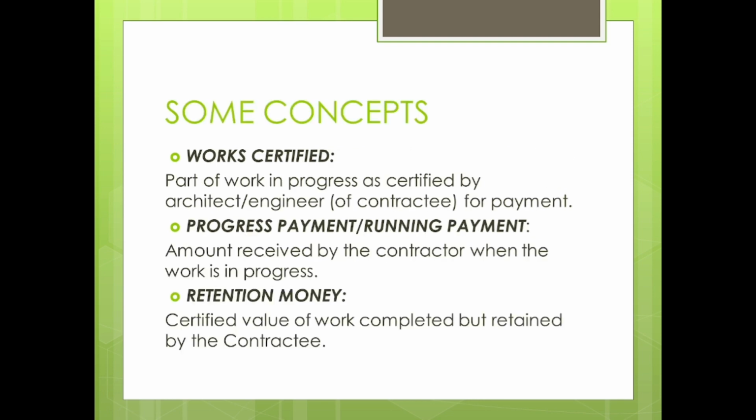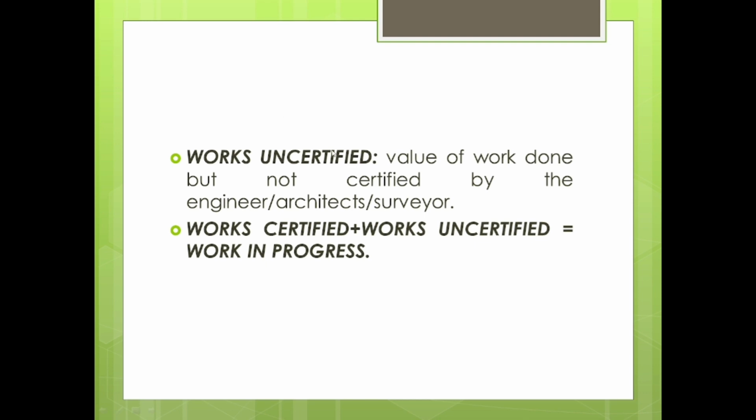So please keep in mind that work certified plus work uncertified makes work in progress. So how much is work in progress? It is the sum of work certified by the architect plus work uncertified. This constitutes the work in progress. Let's move on. There are some more concepts here.